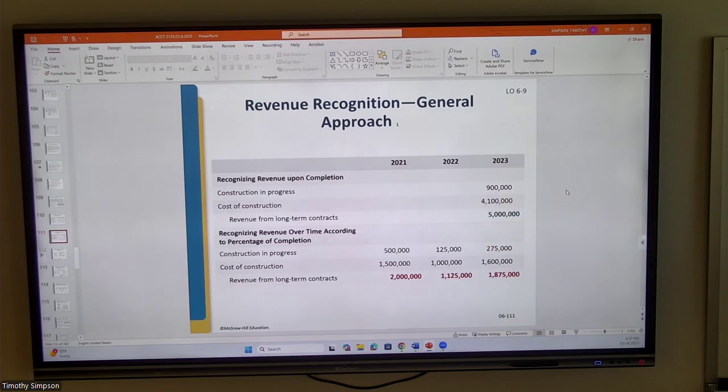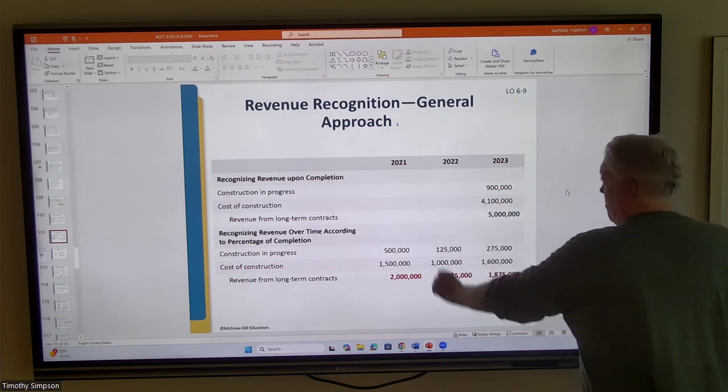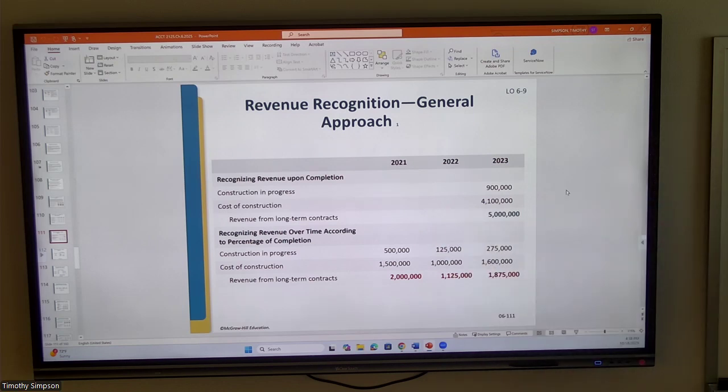And as importantly, profit is also being recognized, because not only are we accruing revenue and posting revenue to the financial statements, but we're also posting expenses as well. And then by implication, the income statement is going to report a revenue figure for those periods of time. Whereas with the single method where we report everything at the end, it's going to be distorted because everything comes at the very end of the project.